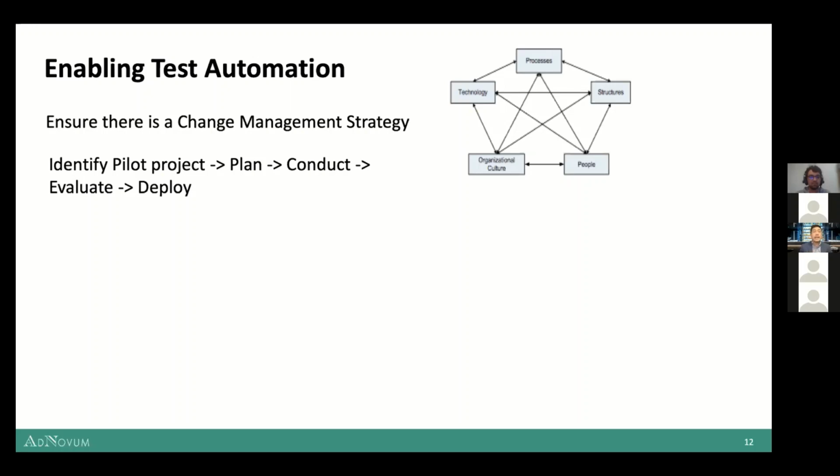If they really need anything, make sure that you are there to support them. Once you finish your pilot project, make sure that you sit down and evaluate whether it's successful or not before you roll it out to the entire company. And when you roll out, don't do it all at the same time. Roll out batch by batch, so that you consistently measure how successful it is and can see the differences between projects or different challenges that maybe one team doesn't see but another team experiences.